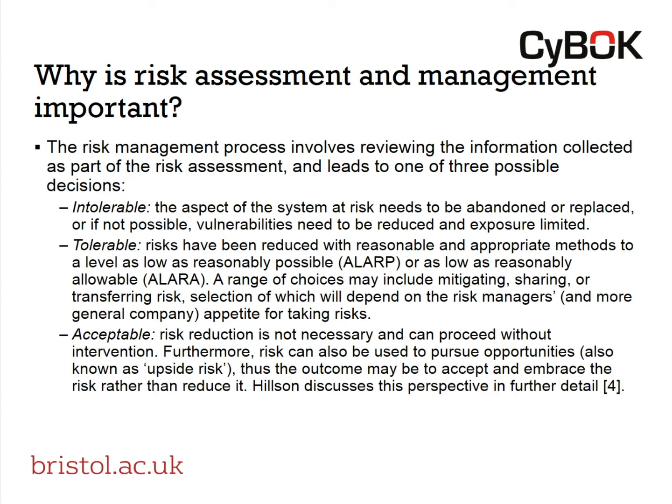So the range, I suppose, of options in risk management or risk assessment, you can have anything from something that's extremely intolerable, which is basically this has to be abandoned. We can't do this within the system because it's intolerable and we can't move forward. There are various principles that allow us to deal with tolerable risks, trying to reduce the risks to as low as reasonably possible or as low as reasonably allowable. We see quite often in safety critical systems.